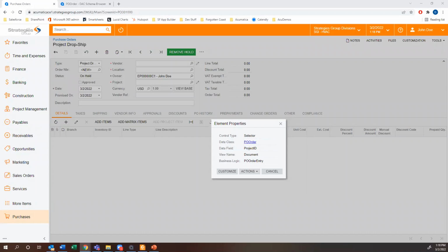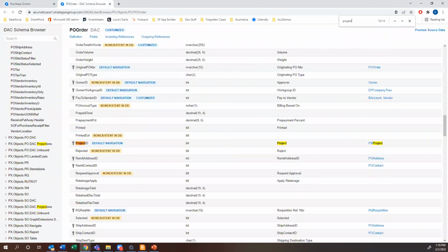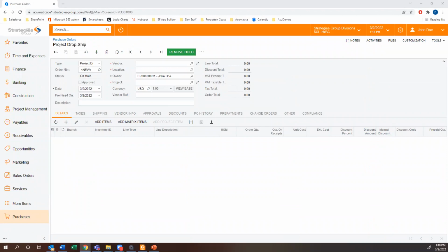So while Daniel's doing that, what he's done is he's added the button, he's created it in the system and have it going to the purchase order screen. And so what he's doing behind the scenes is he is publishing this in the system. As he publishes this, you're going to go back to your project screen. And now when you're in a physical project, instead of just seeing the standard functionality, you're going to see a couple of things that were added.